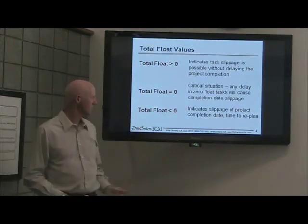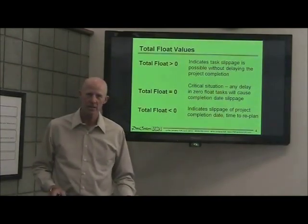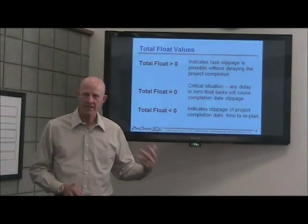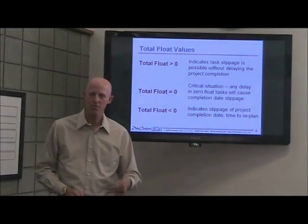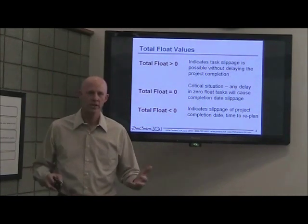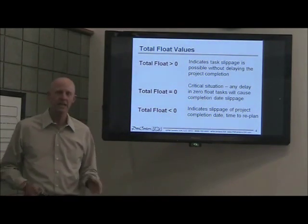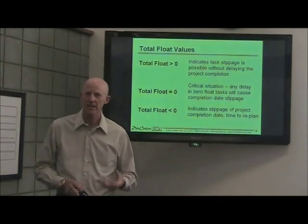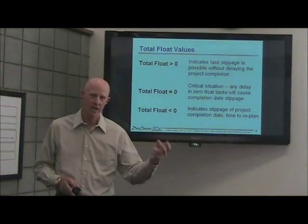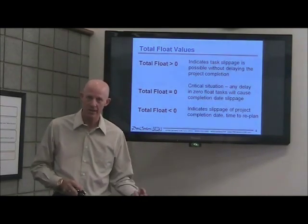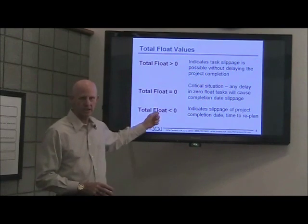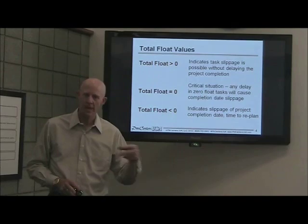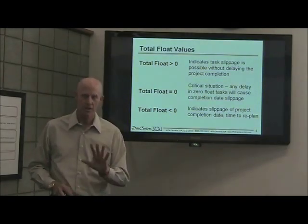If total float is less than zero, it means you're behind schedule. For example, if it's negative five, you are five days behind the date you need to complete the project per the plan. How do you get negative float? You can get it if you put a constraint on your completion date. If you make the project finish date, for example, September 1st and say "finish no later than," you can end up with negative float because it's forcing the schedule to comply with that constraint. So avoid constraints.